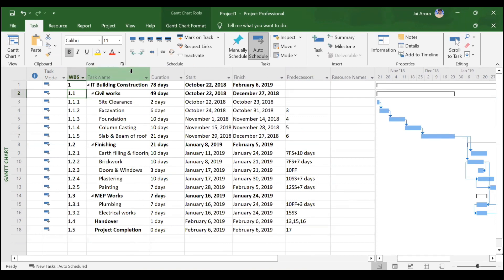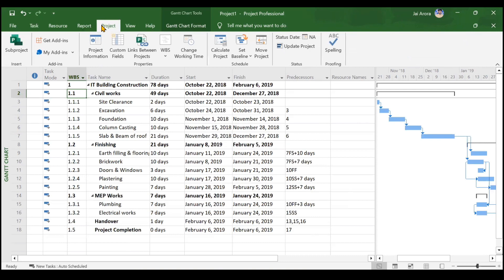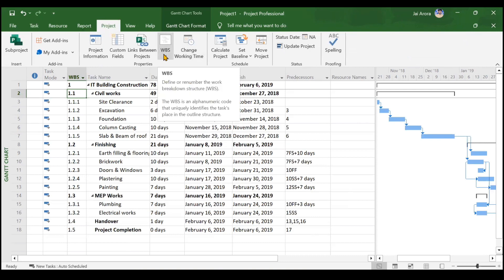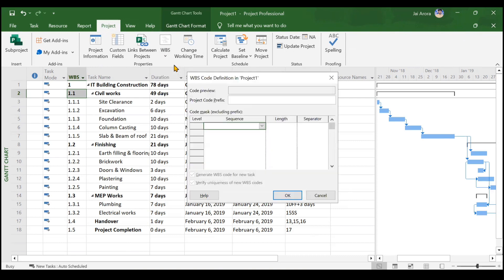If you want to change this default coding, go to the Project tab, where you will see an option for WBS. Clicking on it reveals an option called Define Code, where you can define your own personalized WBS code.